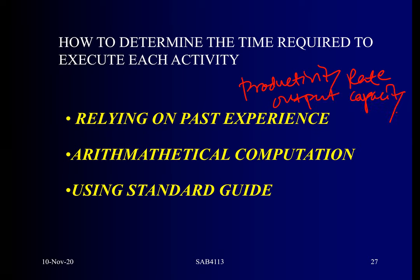Output capacity can refer to machines or labor. Relying on past experience, the easiest way to get the productivity rate is by looking at previous projects. That's why as a contractor, you should keep your productivity rate database — in Excel or some simple system — so that you can reuse it. Productivity rate really depends on each organization; if you copy it from another organization it won't work well with your work method, though you can use it as a base with many adjustments.